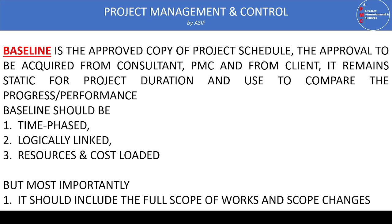The baseline program is used to compare the progress and performance of the project. There are some special features to consider: the baseline program should be time-phased, meaning activities are planned against a timeline. It contains several activities — the number depends on the size and value of the project — and these activities should be linked to each other with logical links. It is better if the program is resource and cost loaded.